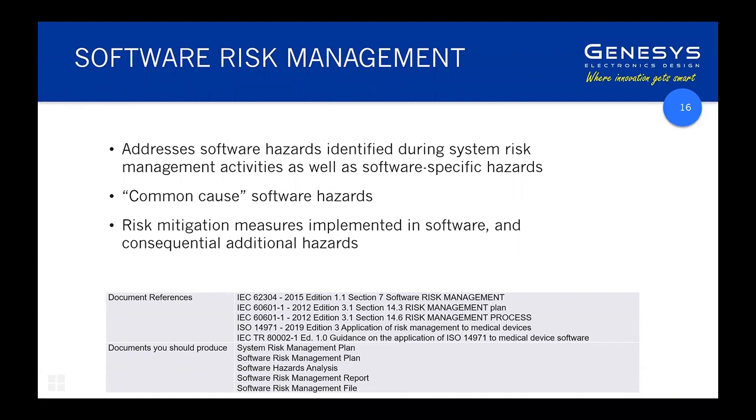The sensible interpretation of it is, in assessing initial risk, assume that the software failure occurs, but then in looking at residual risk, assume that measures that have been applied are effective in reducing that probability of software failure. For example, complying with IEC 62304. If applying IEC 62304 does not reduce the risk of software faults occurring, there's no point in having it existing. So it is an interesting challenge.